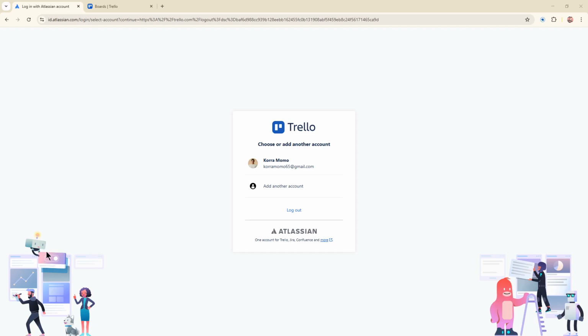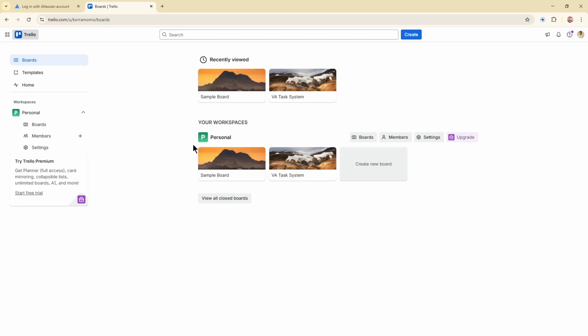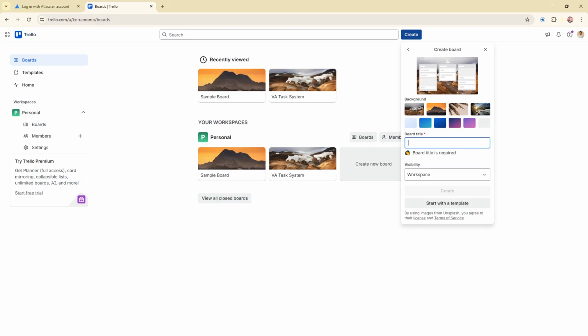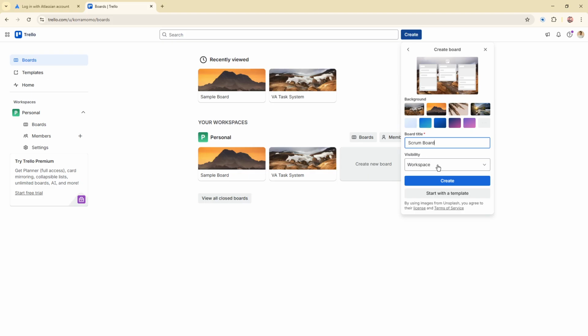In today's video, I'm going to teach you how to use Trello for Agile project management. Start by going to Atlassian and making sure you're already logged in. Once you're in, click Create and then choose Create Board. This is where you'll set up the workspace your team will use to track Agile tasks from planning all the way to completion. When the board setup opens, name the board Scrum Board, then click Create.